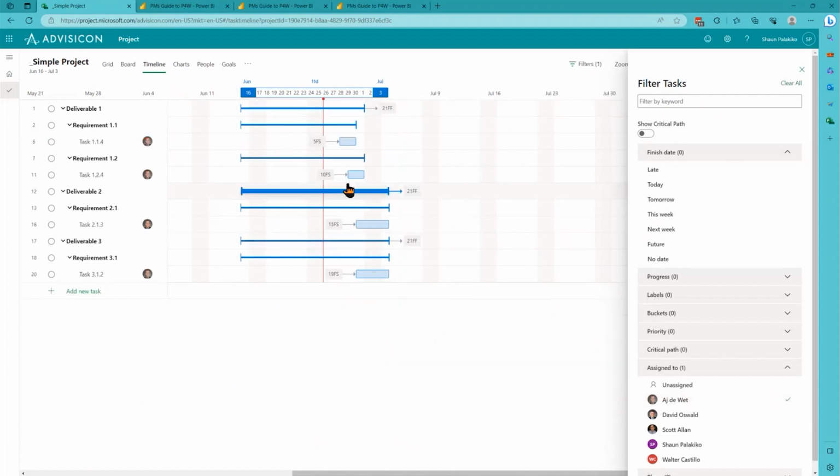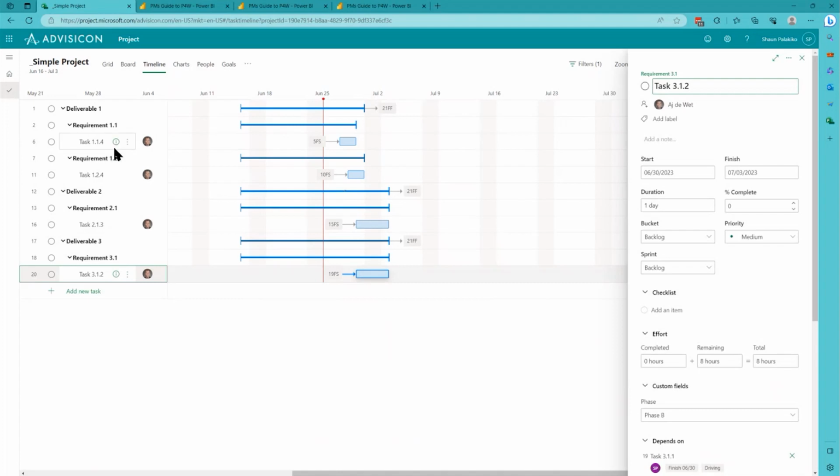All right. When I do that, I can see it looks like there's some overlap, right? AJ can work on this one, that's fine. AJ can work that one. So one day assignment, another one day assignment. AJ is going to start on the 30th. AJ started on the 30th. These assignments are overlapping, so that can't be. AJ can only work on one assignment at a time, one deliverable at a time.